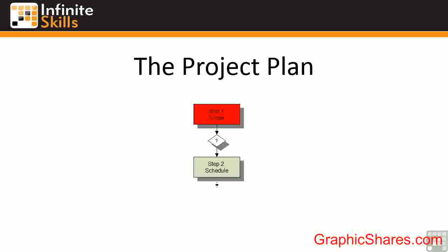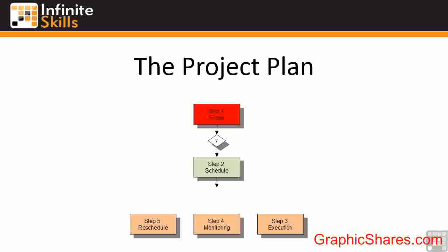Once you've built the schedule and resourced your project, we then look at starting to execute the plan — to actually carry out that planning, carry out the project, carry out whatever you're trying to do. During the execution you will monitor the progress and inevitably reschedule steps of your project. No project ever goes to plan. So steps three, four and five are effectively a loop that will keep continuing until you get to the end of the project. In Microsoft Project 2013 you can keep an eye on the baseline — that's the blue dotted line — and effectively measure yourself against that point.